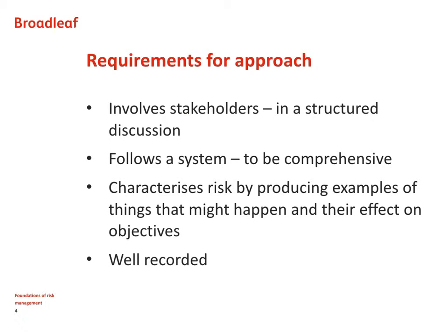The fourth requirement is not always obvious, and that is that the approach is well recorded. A lot of emphasis is placed on the facilitation of these discussions, but as you might imagine, unless the discussion and its outcomes are well recorded, ostensibly we've wasted our time, and particularly we've wasted the time of stakeholders. So whoever records the conversation has an important part to play as the person who facilitates the conversation.